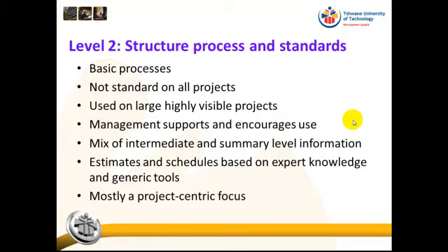Then level 2 is where we have a structured process and we have standards. Here we have basic processes, but they are not yet standard on all projects. So we use them on large, highly visible projects. Management supports and encourages the use, but it is not a requirement that all projects should use these standards.